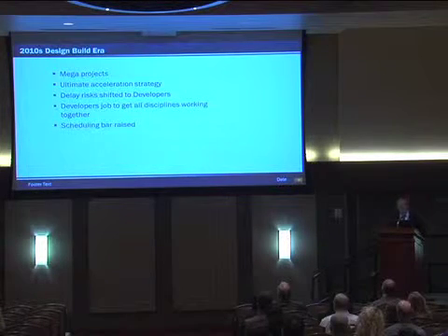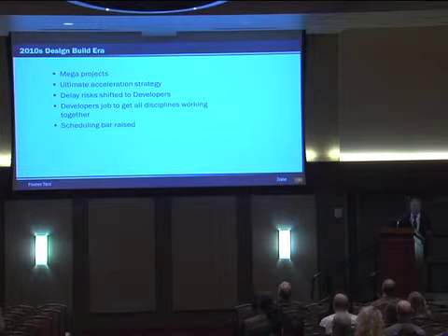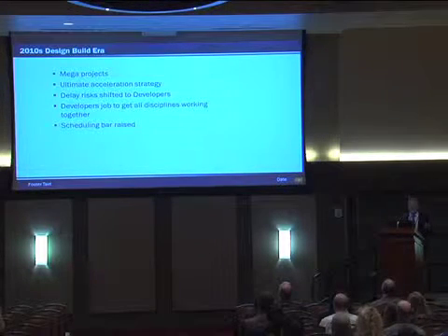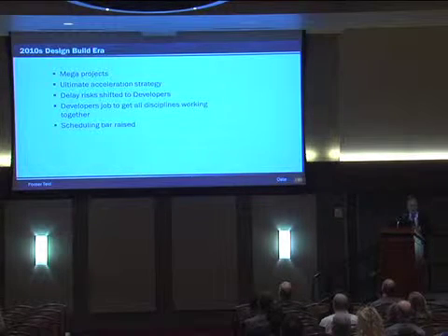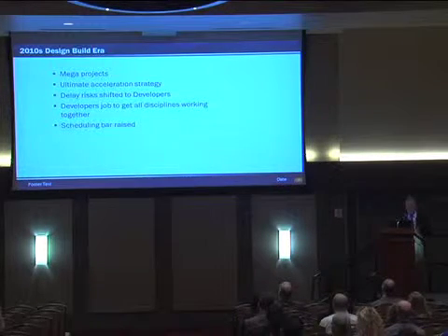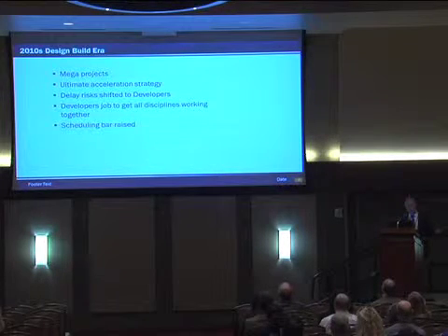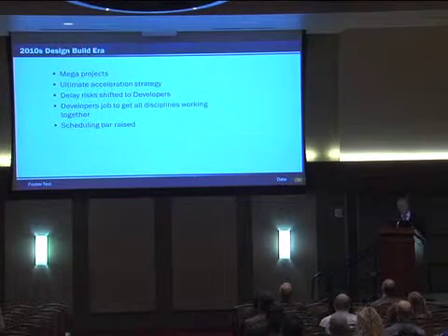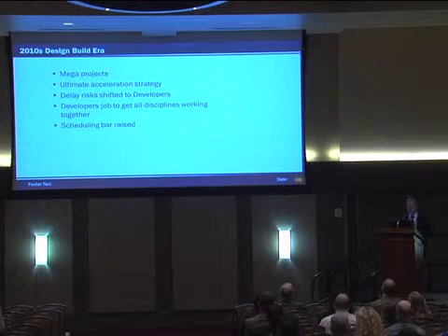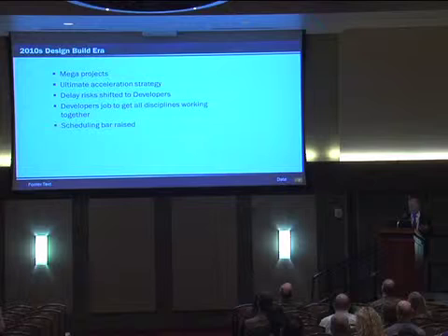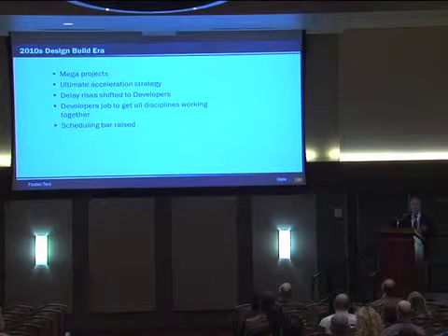Now in 2010, we have the design build era. This is the mega project era. This is the ultimate acceleration strategy, if you have it. It's really trying to get all the parts working together. Plus, TxDOT's shifted most of the delay risks to the developers. So less delay claims for TxDOT, and it's the developers' job to get all the disciplines working together. And they're doing this through the schedule.